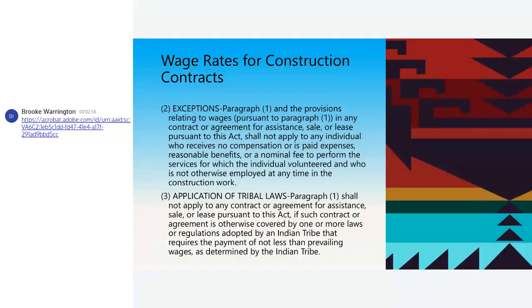Those guys had those notebooks and they had when they went on, when they came off, what they were doing, and they won their thing. I was very proud that that happened, you know. So when you work with those, your tribal members are doing that, and they explain to them what Davis-Bacon is, have them track their time. But you're supposed to also go out in the field and have somebody that does that on your behalf. You have to do interviews, okay? So there's rules that go with those labor requirements, okay?